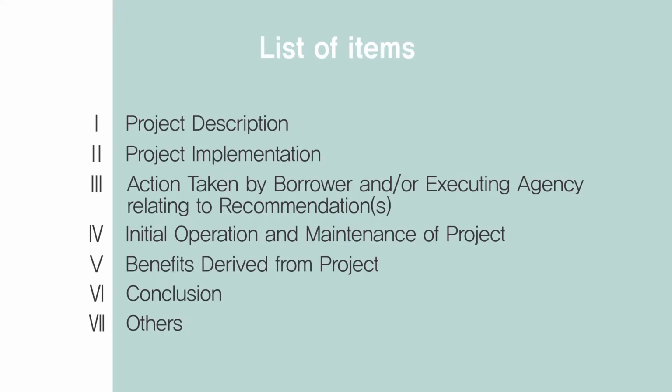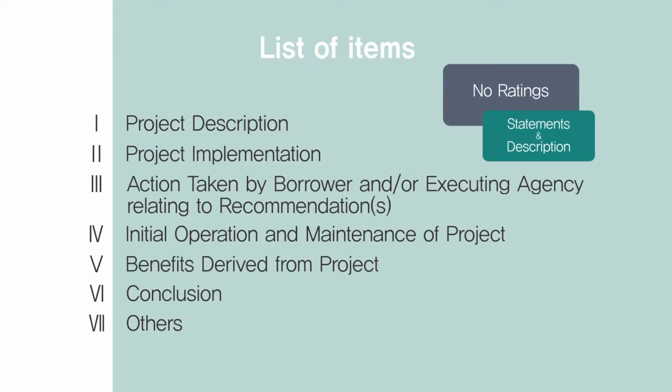Compared to other agencies' PCR, however, EDCF's is more focused on the statements and description of what happened during the project implementation. In case of a discrepancy between the original plans and the actual results, the reasons should be presented in detail, including the situations encountered. If any problems have resulted from such discrepancy, such problems should be described, together with the measures taken and the results. For items unmodified, no modification or equivalent is to be stated.